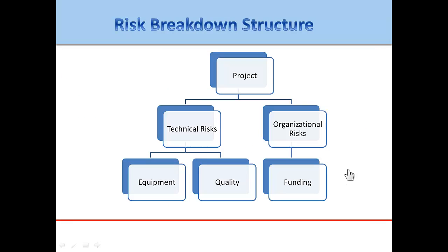Now, here's a risk identification tool that you will likely figure out very quickly based upon your knowledge of the work breakdown structure tool that you learned about in PMD Pro 1. A risk breakdown structure is a hierarchical framework of potential risk to a project, and it should be both comprehensive and detailed, just like the WBS.